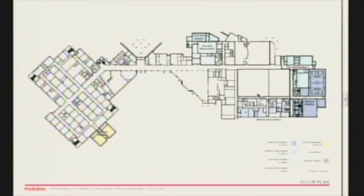I'm finished, I'm through, I'm sorry. The third gym, the one that you're adding, looks substantially slimmer. What are you going to be able to do around the edges there? Is it just enough for a row of chairs? Well, at the moment, the gyms at Haltom and Richland, the third gyms do not have any bleachers, and so this was originally planned to have no bleachers. So that's how the base bid will be, but we do have an alternate planned to get 250 seats in there because we do know that it's a desire to have some seating in there.